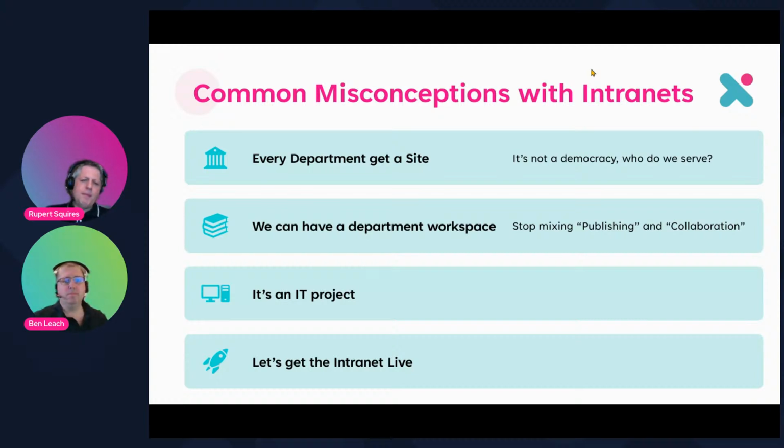Okay. And then the third one, it's an IT project, right? We're using technology, so this is something that IT need to be leading. That is a big no. It definitely needs to be led by the business. It really needs sponsorship or buy-in from the executive leadership team so that they can promote this and make sure that people are given the resources and the time that they need. So absolutely, it's a business project.